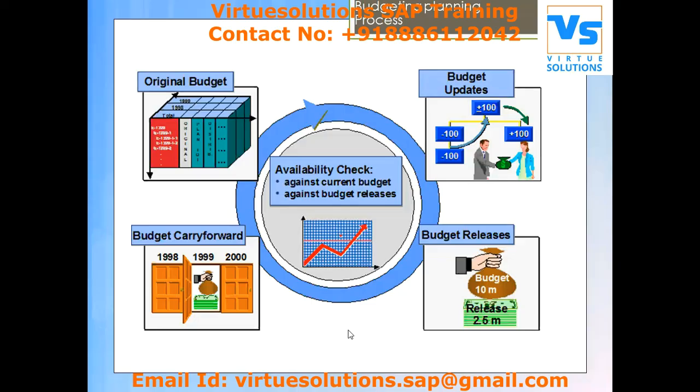The moment I release that budget, the system will allow me to start execution of the project so that I can book timesheets, or any procurement-relevant activities, sale licenses or something like that, or maybe services, or any general voucher if I want to post. These are the different day-to-day business activities that we can perform.